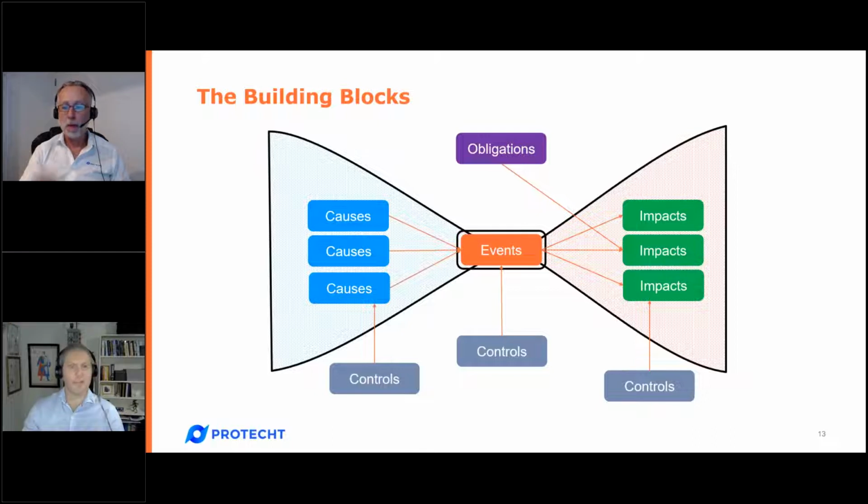I just add there that I guess the building blocks was how I really reframed the way I thought about risk, and went back to my organisation and looked at how risks were framed and just really picked apart the risk registers. And there were things like failure of third-party suppliers being listed as a risk, alongside failure to select the right vendor, which essentially is the cause of that risk. And like I said before, there could be hundreds of risks across multiple risk registers. And once we looked at that process, it really consolidated that down to much fewer, as well as identifying that people were calling out things like inadequate controls and calling them a risk, when really they were just part of that bow tie linked to a broader risk. So it was really powerful.